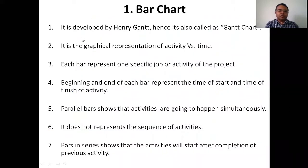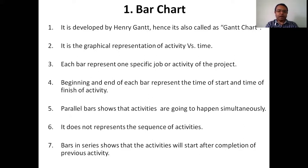The bar chart was developed by Henry Gantt, so hence it is also called a Gantt chart. It is the graphical representation of different activities versus time, and each bar represents one specific job or activity of the project. Every bar represents a different activity, and a single bar shows a single activity.